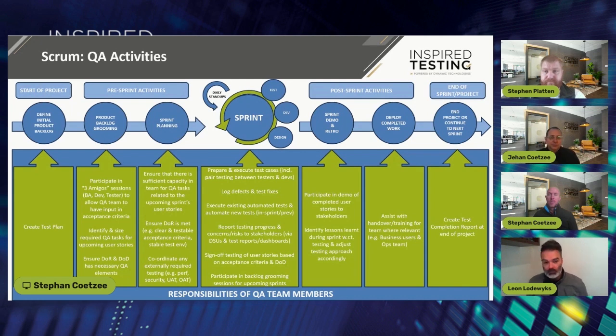I've seen a lot. Okay, go after Steve. Go for it. What I've seen in many teams in terms of making that decision, practically, if it's the middle of the day and you find a bug, testers don't usually just go and contact the business, and we can't just wait till the end of the sprint. Testers also don't always know who to allocate the bug to that they're logging. So I've seen teams assign it to the lead dev, who then decides who that bug most likely should be allocated to.